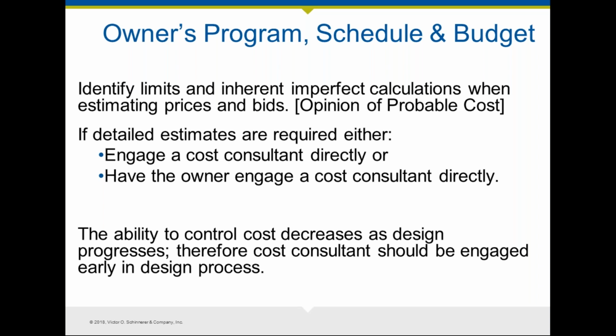experience and also based on conceptual cost data that you may have. So you may know that laying concrete pipe of a certain size may cost so many dollars per lineal foot. You may be able indeed to provide them with that kind of guidance, but beyond that, ultimately, oftentimes design firms are not in a position to provide the owner with an assurance. If the issue is important, and it often is to the client, you should guide the owner to engage a cost consultant directly, or you can do that as part of the services and make sure that you're engaging somebody who can provide that type of service to the client.